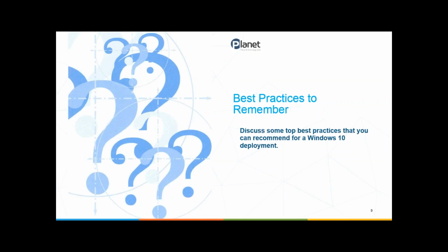Sorry, muted. No problem. The best thing I recommend is to make sure to get all their applications into either a package, scripted install, or an application, so those can be deployed through the task sequence and don't have to be put into a base image. That should be one of the big first things you do: make sure you have everything as a package or an application. Other recommendations is not to do too many changes at once.